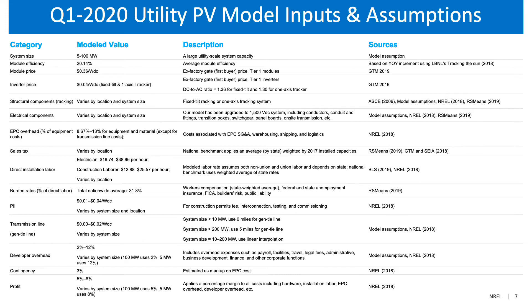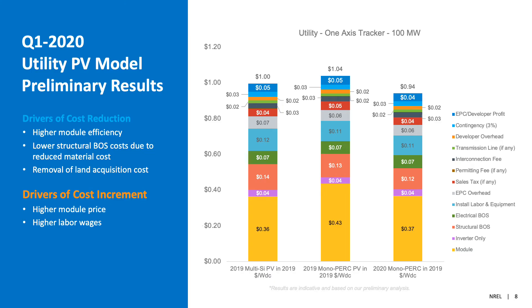These are the assumptions and their associated sources of data. One of the main sources for our assumptions comes from Lawrence Berkeley National Lab's Tracking the Sun report. Our model efficiency, DC/AC ratio, inverter market share, and the market share between small installers like third-party-owned companies versus large integrators — all this data comes from LBNL's report for this preliminary analysis. However, module, inverter, and commodity prices and other soft costs are based on interviews conducted with developers and other independent R&D firms.